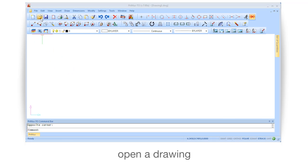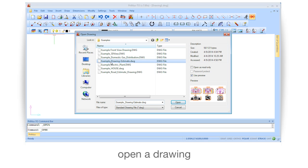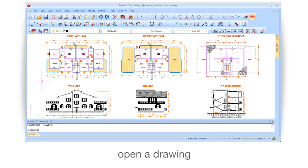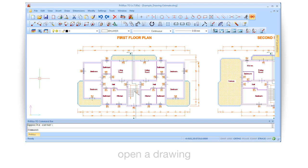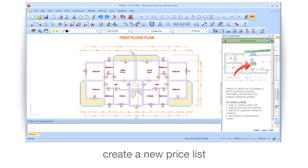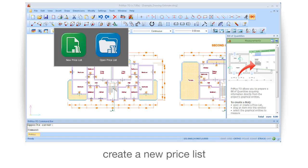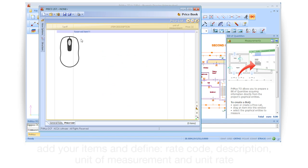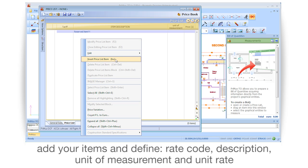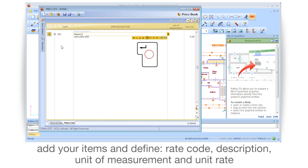Open a drawing. Create a new price list. Add your items and define the rate code, description, unit of measurement, and unit rate.